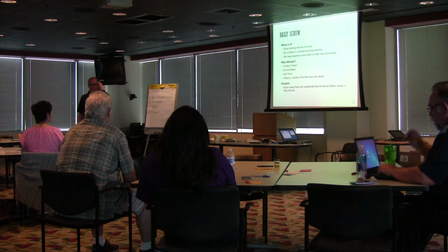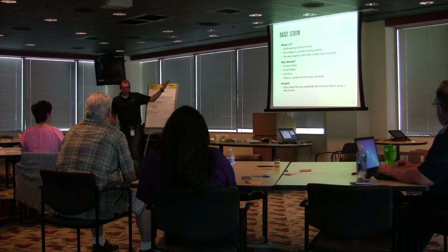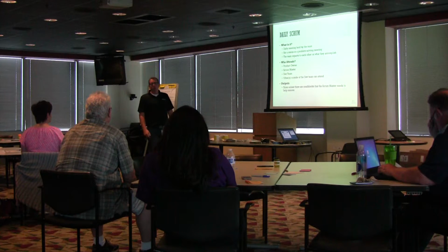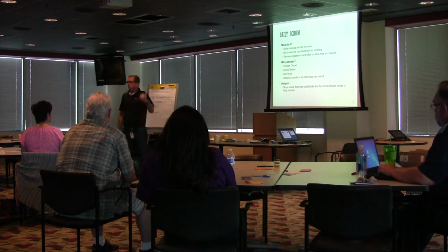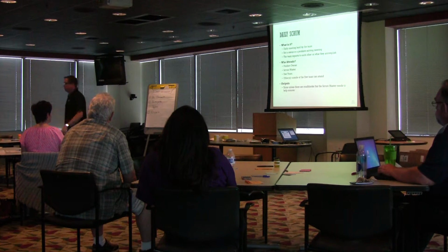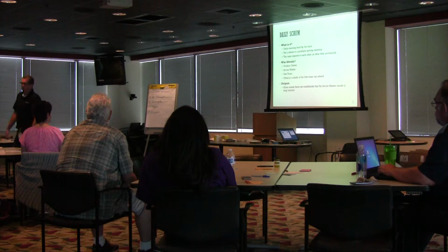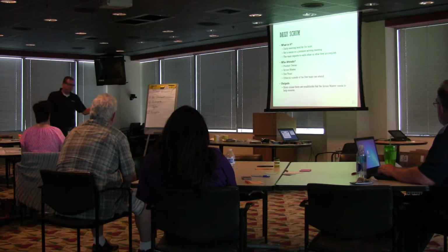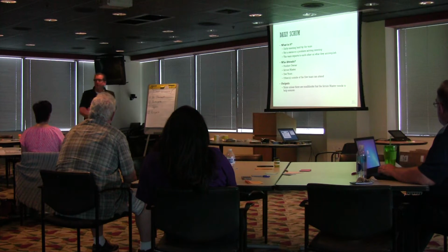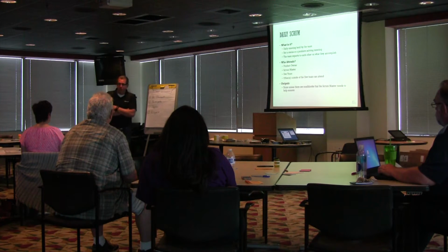What about the scenario where, if I'm a developer, I've estimated my task or my work to be a day's worth of work, and I report to you, hey, I'm working on this thing. I'll have it done in a day. Next day, I say, still working on it. Day 3, yep, same thing, working on it. If I'm a tester, I'm getting a little antsy. I am. Because again, if you think about it as a planning event, I need that to test so I can get to the next thing. So what can I do to help you get that done? What's missing? Do we need help, right?